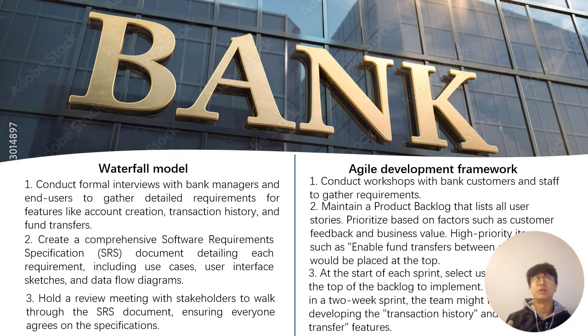The third one, I think, is handling changes in requirements. We need to acknowledge that change always exists. In waterfall, changes to the requirements after the initial phase are often difficult and may require formal change control processes.